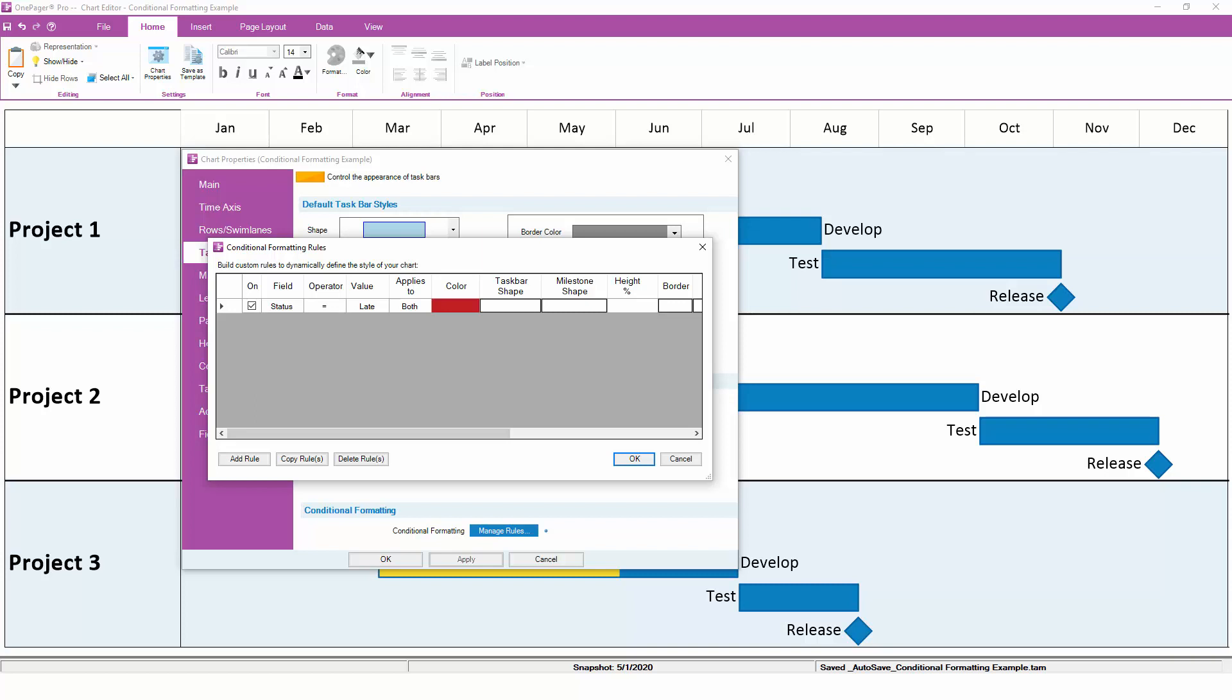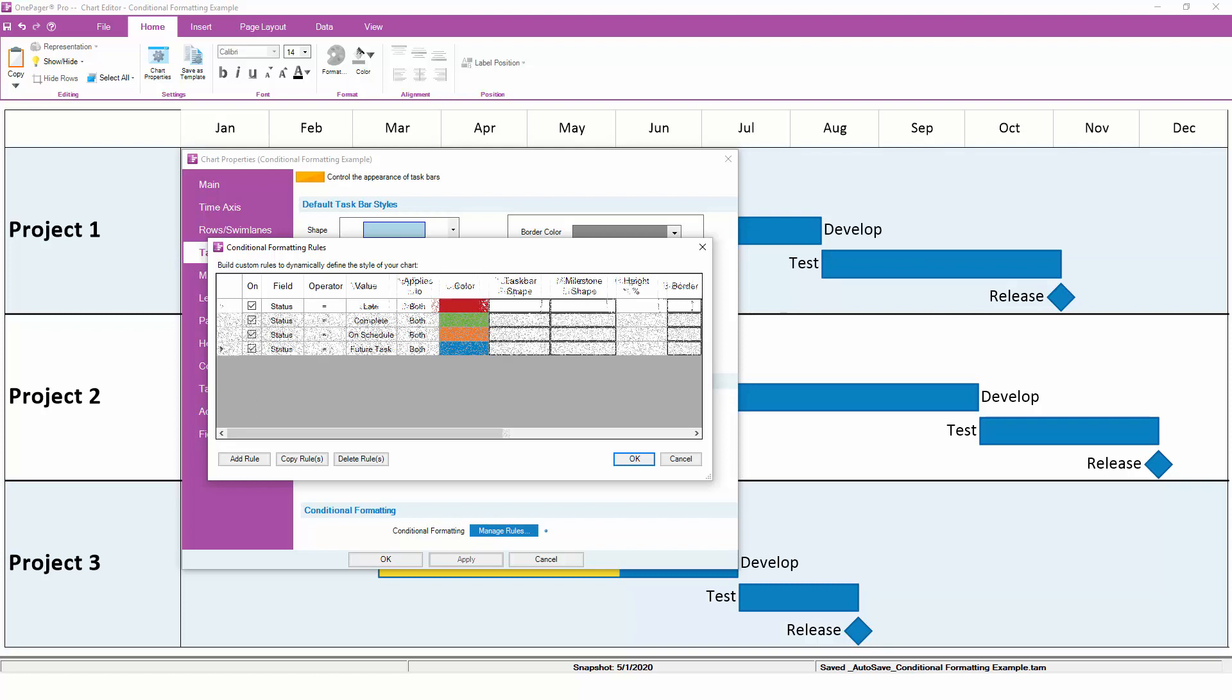Now, let's add a few more rules to cover completed tasks in green, on-track tasks in yellow, and future tasks in blue.